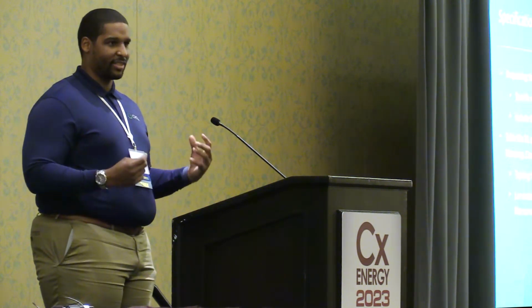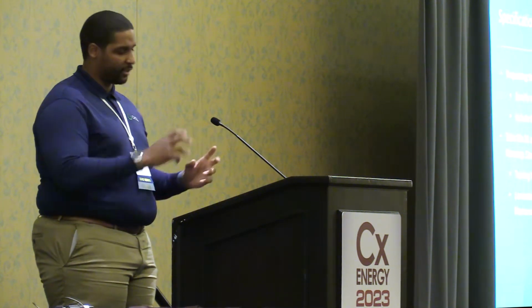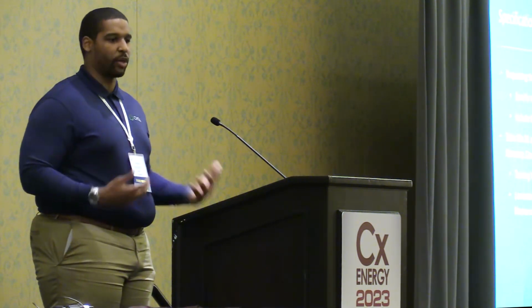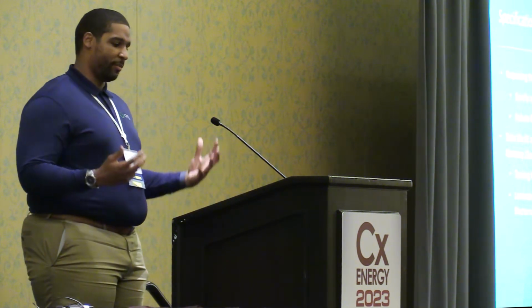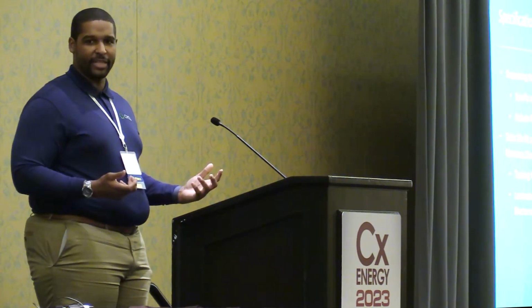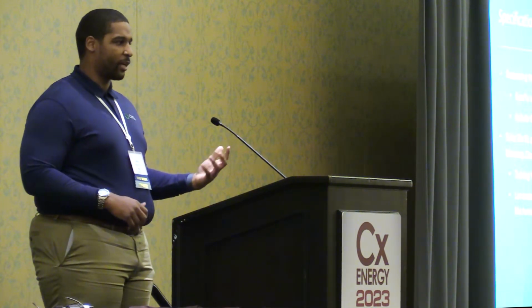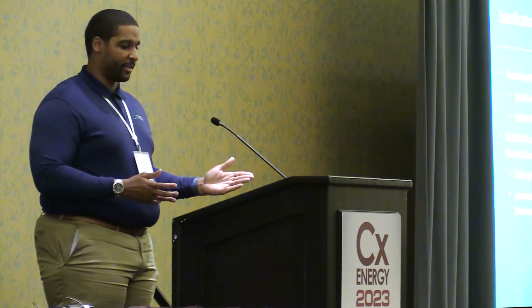So those are the type of things to get more deep into, not just your simple, this is how the systems work, but get deep in what actually works for you. And you can put all of that into specifications. And for me, one of the biggest things, it's a simple ask, but something that no one really takes advantage of, like a laminated riser diagram in your electrical room. It costs nothing if you put it in there in the beginning.